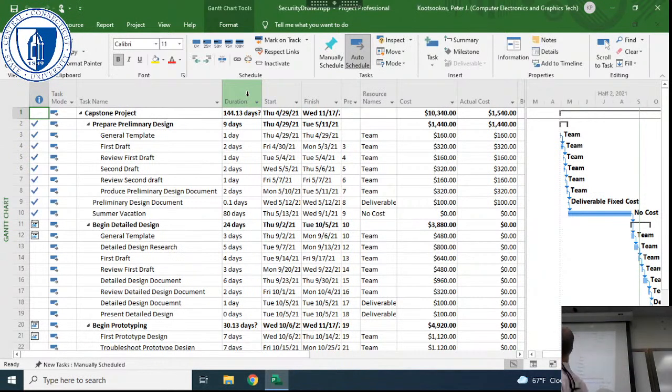So this column here is the cost, and it should be just the 8 hours times 1 day times 20. So this number here is called the cost, but in this context, that's the planned value, PV.